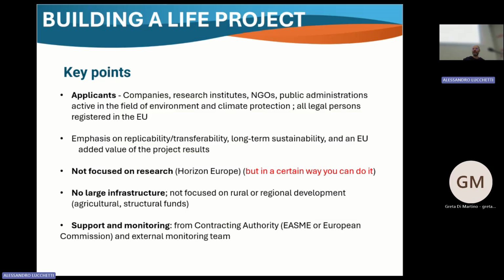They follow the project from day one until the end, and they give you tips, advice, and alerts when you are doing something strange. You can ask the monitoring team a question every day. You have to report to the monitoring team any communication that you have with the European Commission.